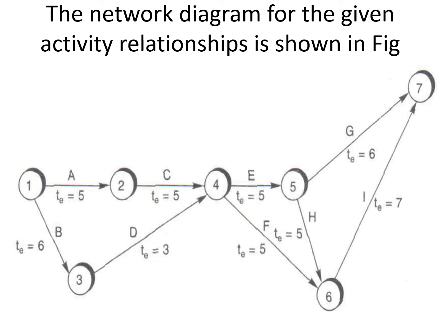Besides events, PERT also involves the creation of activities and sub-activities. A PERT activity is the actual performance of a task which consumes time and requires resources such as labor, material, space, machinery. It can be understood as representing the time, effort, and resources required to move from one event to another. A PERT activity cannot be performed until the predecessor event has occurred.